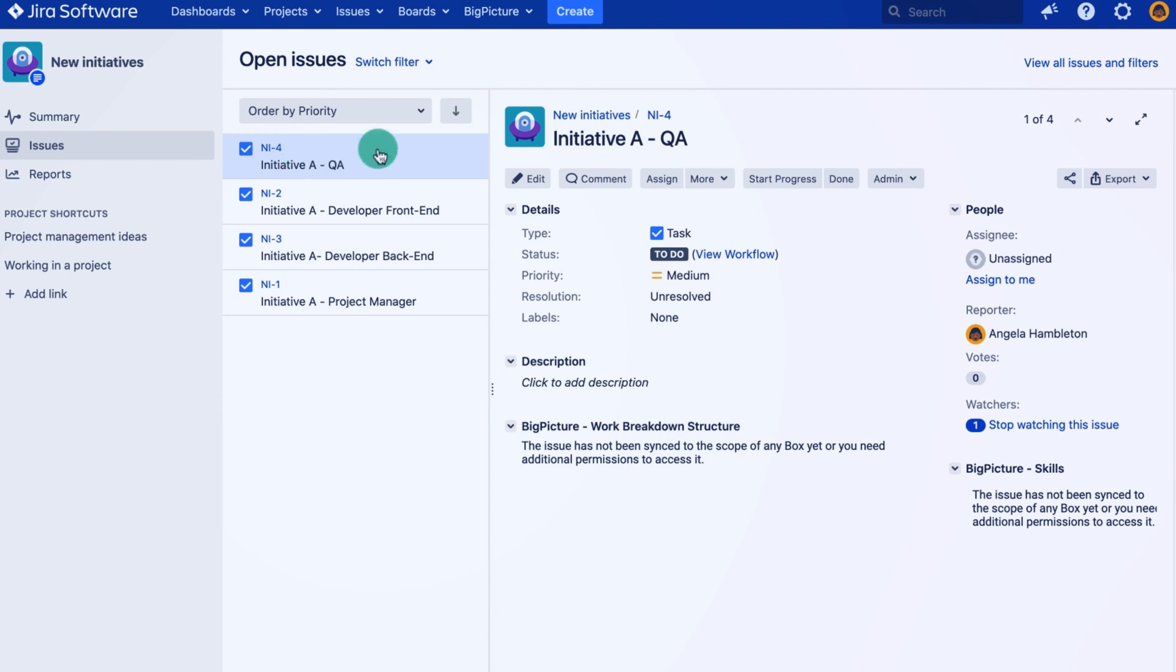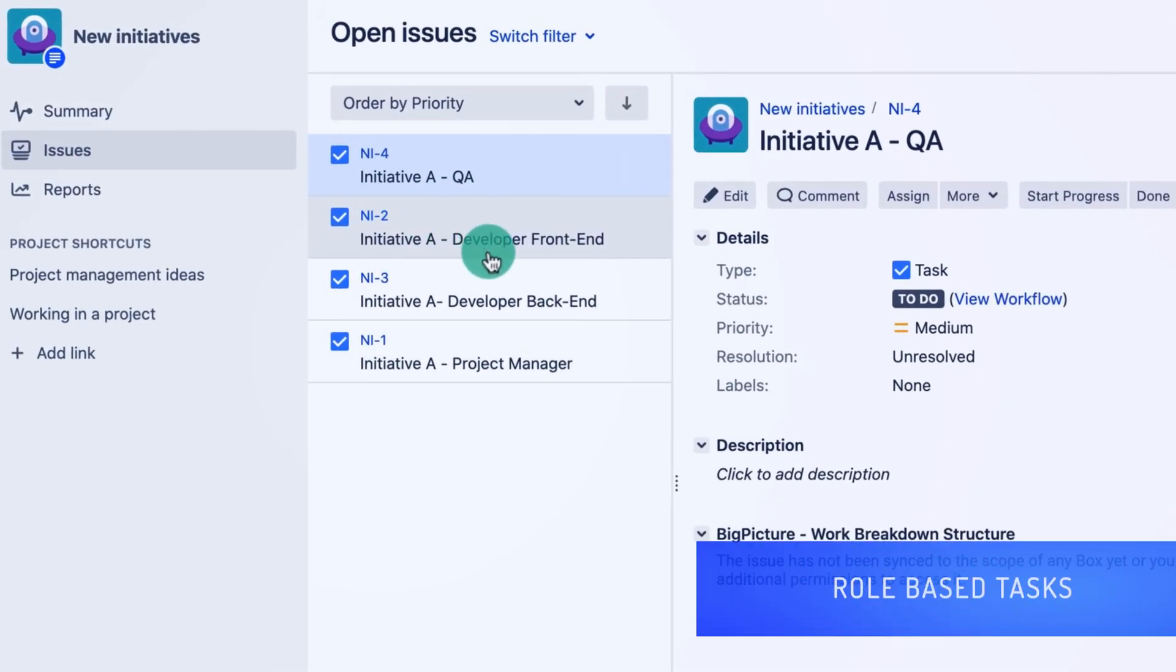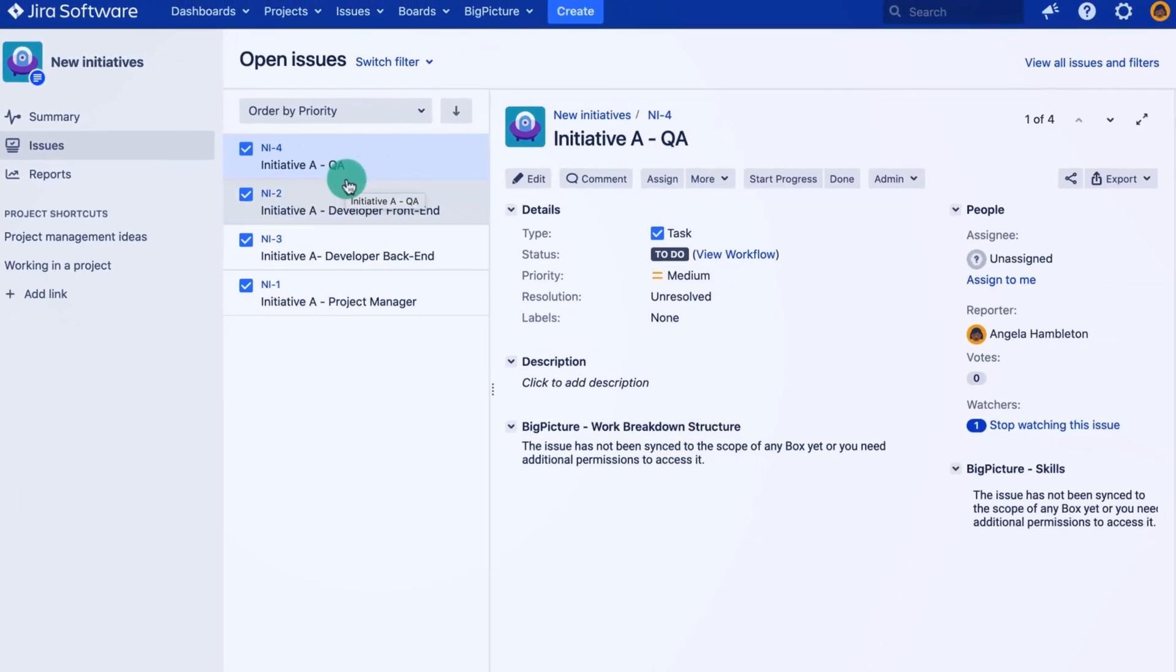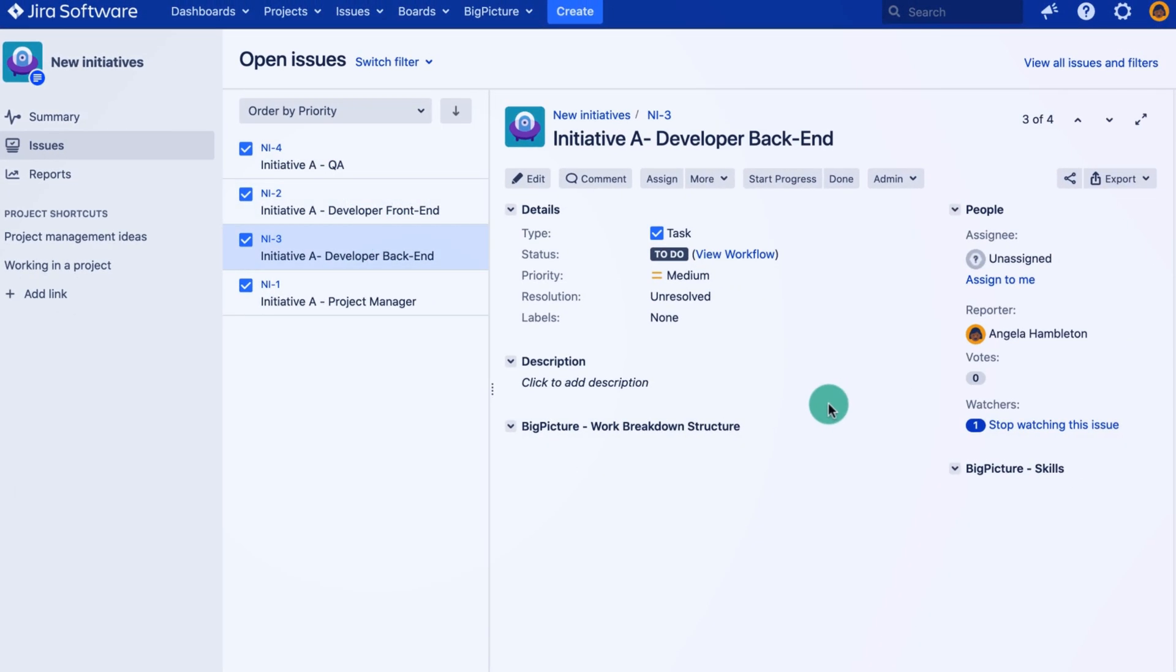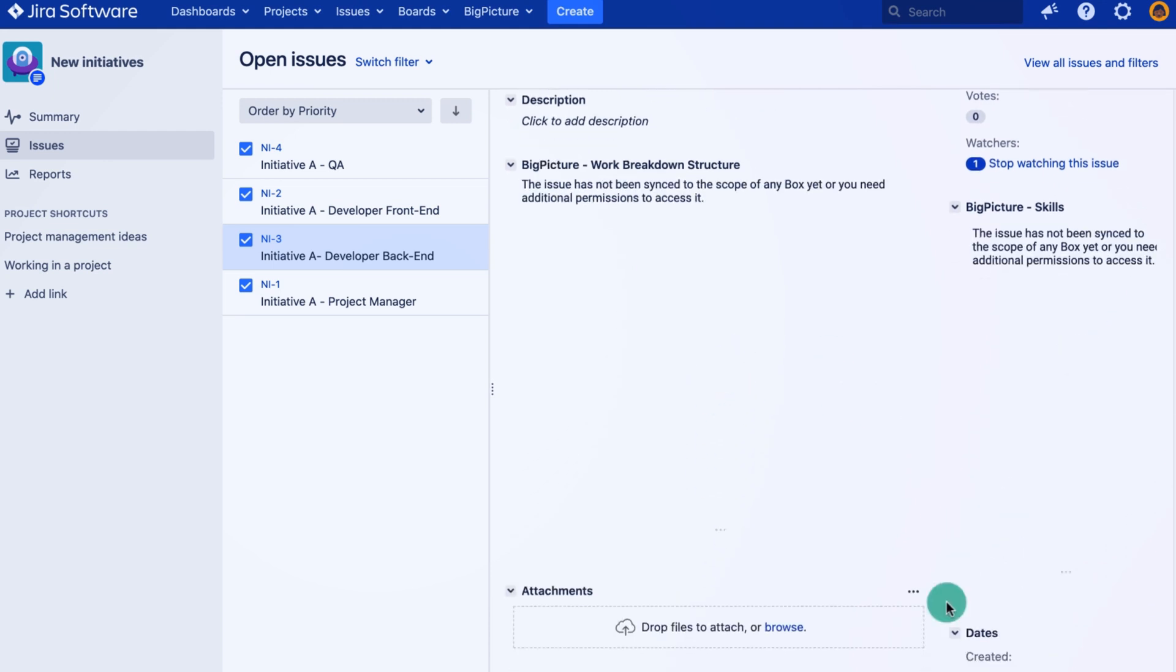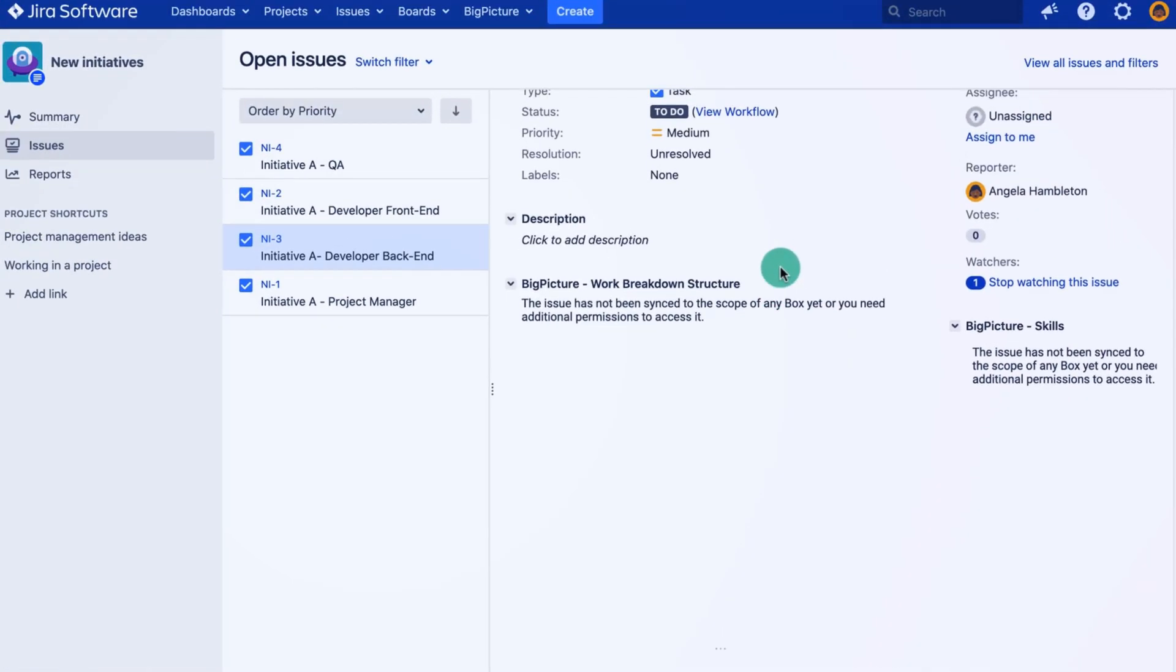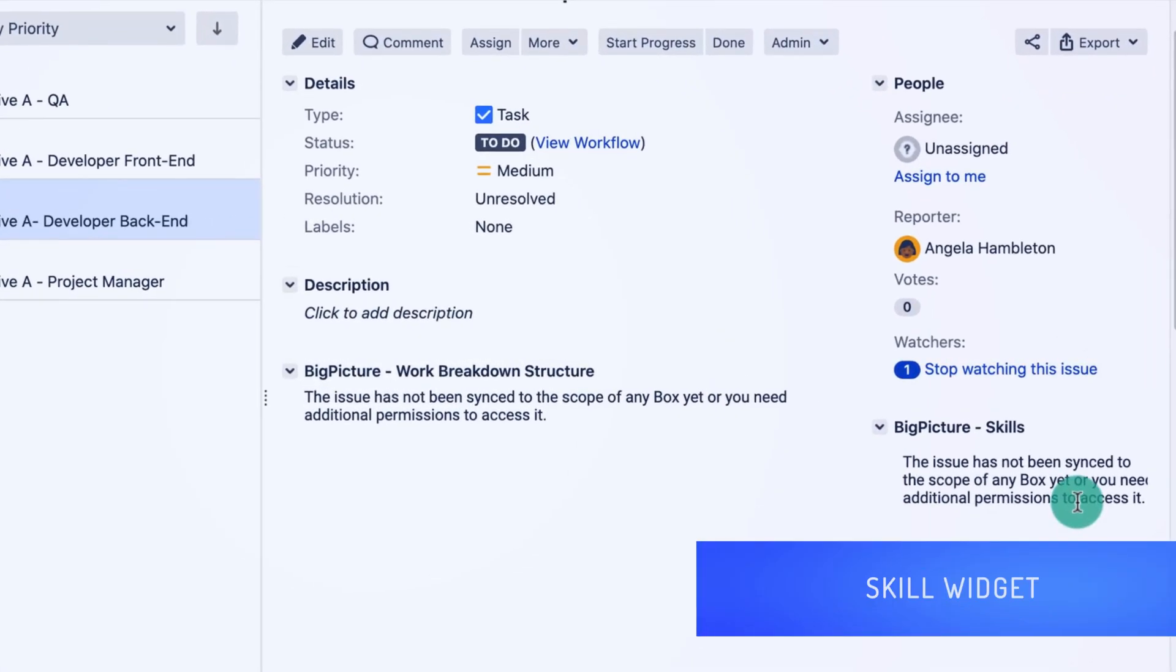As you can see, I have a couple of tasks created. I call it Initiative A, and I will need a project manager, developers front-end, back-end, as well as QA. Now for each of these, I already defined based on my experience that I will need it for roughly five weeks in case of this back-end developer. As you can also see, I cannot define a skill yet. That is for a reason.